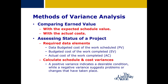There are two main methods of variance to calculate in project baseline-to-actuals analysis. Both methods use the earned value for comparison to determine the level of variance. One is the schedule variance, and the other is the cost variance. These formulas use earned value compared to the planned value for one and actual cost for the other. For both variance formulas, a positive is good and a negative is bad.